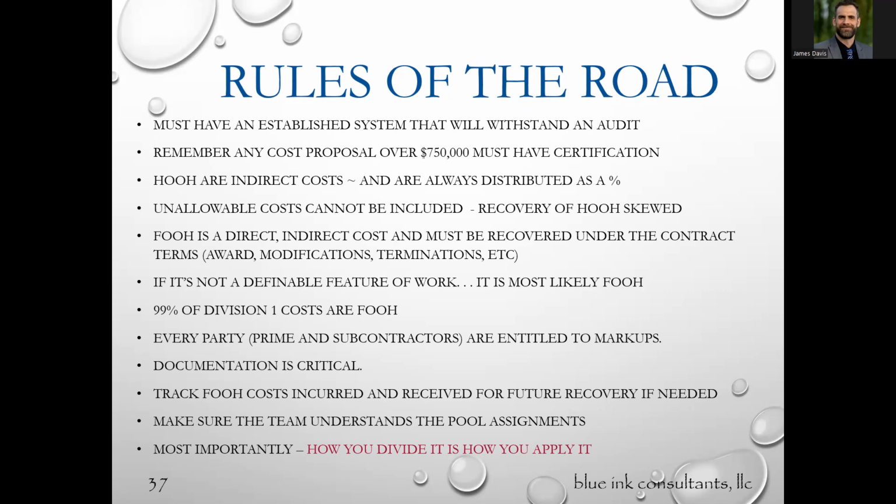Assuming you're dividing by revenue, they will fluctuate. If you don't have as much business in the year, of course, that number is going to change. If you have a little more expenses that year, your numbers are going to change. But the government, because they don't allow certain expenses in your overhead, that number might be different. So if you charge your clients 12% across the board, that's what you were paying last year. The government says, once you take out the things that are unallowed, you might only be at 10.5. You just have to remember that, be able to substantiate it, be able to support your other costs, okay?